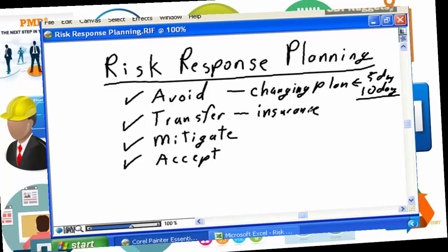If there is a risk that your project is going to be impacted by weather, if you live in an unstable climate where there is a risk of fires, floods, earthquakes, you may want to take out insurance that is going to insure both your property and provide some financial recovery should your project be impacted by insured events.